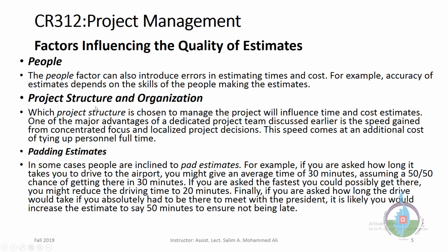Project structure and organization. As we visited, project organization is very important for doing projects. Which project structure is chosen to manage the project will influence time and cost estimates. One of the major advantages of a dedicated project team discussed earlier is the speed gained from concentrated focus and localized project decisions. This speed comes at an additional cost of tying up personnel full-time.